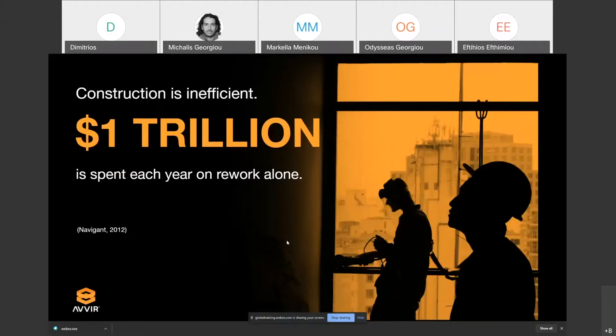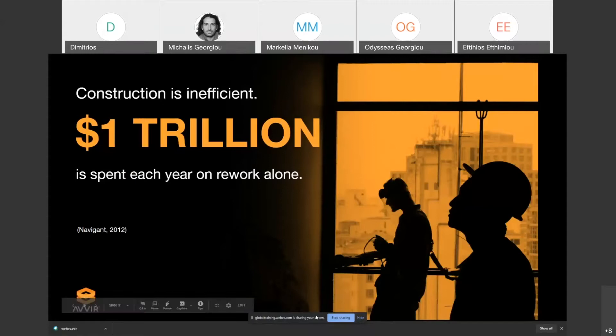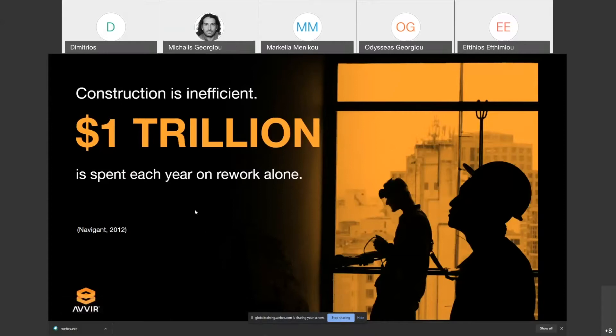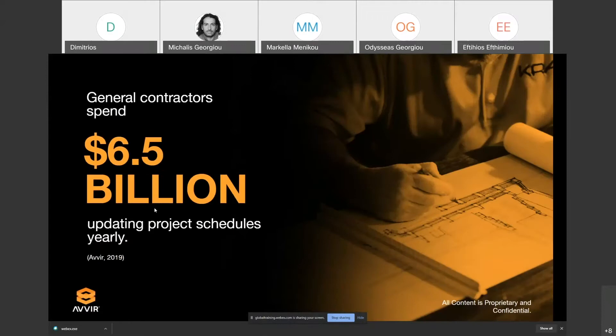AVIR started three years ago. The incentive for starting AVIR was that construction is fundamentally an inefficient business. There's $1 trillion spent each year on rework alone, and general contractors spend $6.5 billion just updating project schedules yearly.